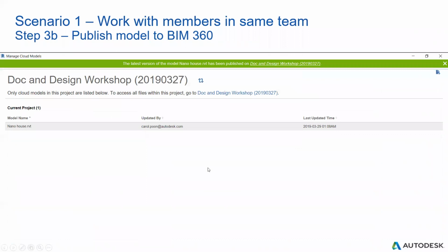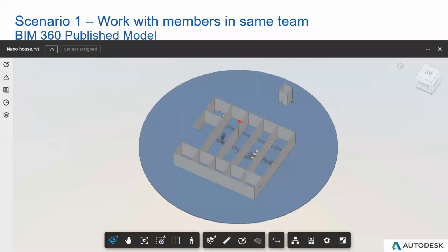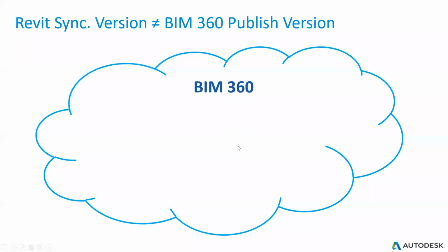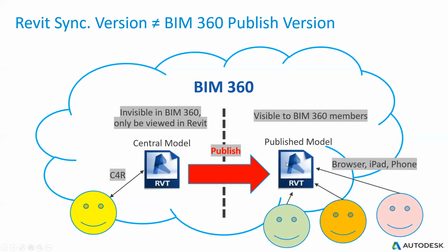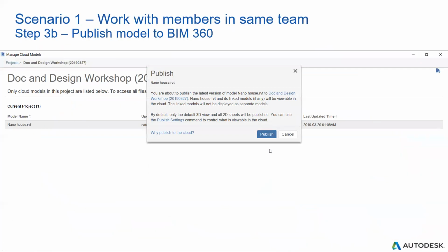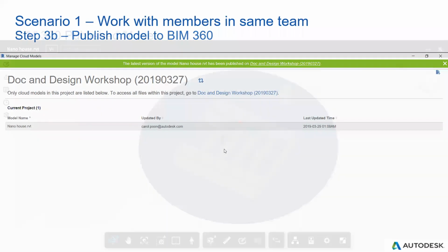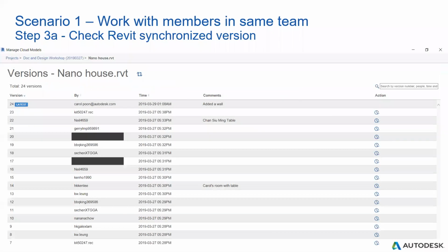And if we want people to view our models on the cloud, just like this one, this is the browser from Firefox, we have to do an action, which means publish. Only when we publish the model can we see the published models, and different parties can see the published model on the cloud. So we have to click a button here. Okay, let me go back.